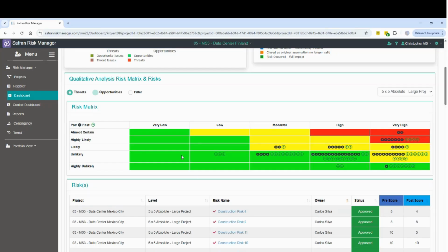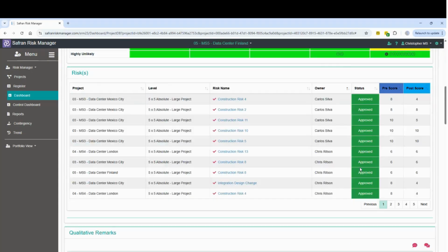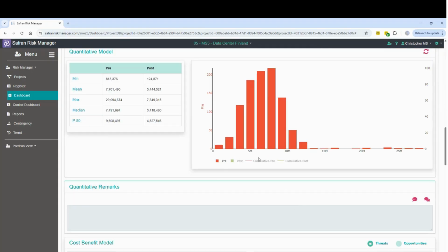But for all intents and purposes, if we looked at it purely in the probability impact diagram way, you would think that this is an okay risk. But really, you can see that the low likelihood, very high impact that this could have on my project could potentially be catastrophic. And therefore, we want to be investigating that data set.